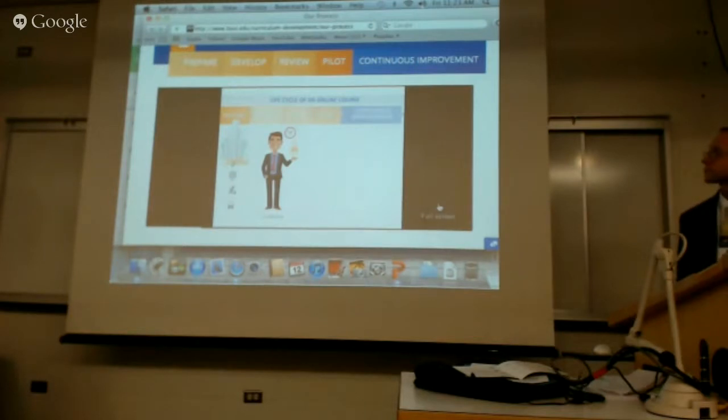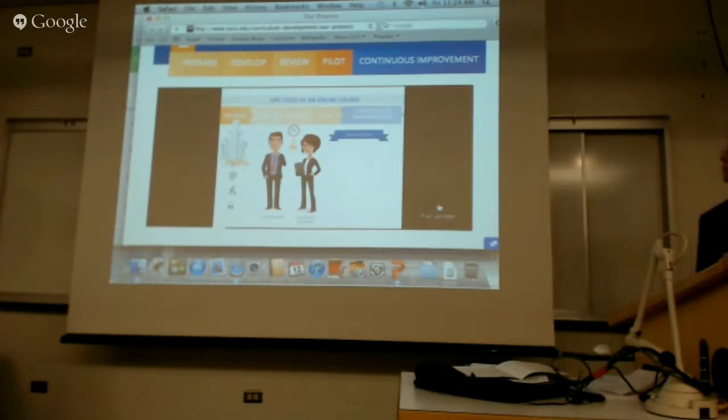Simultaneously, the online department assigns an instructional designer, known as the curriculum designer, to the project. The course lead and the curriculum designer form what is called the course council. They, along with a team of student employees, will design and build the course. During the pre-development semester, the course council meets together a few times to review the course outcomes and objectives to ensure the online course aligns with the face-to-face classes. They also begin planning for any textbook, video, or audio needs for the course.